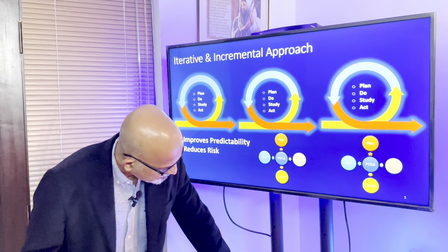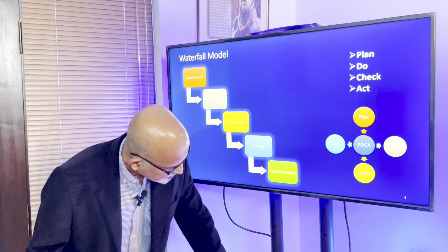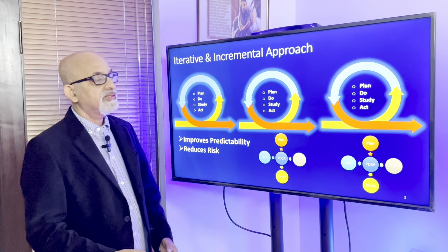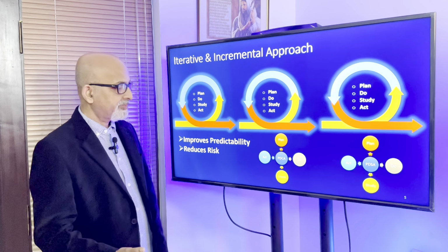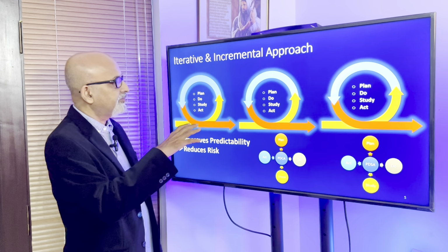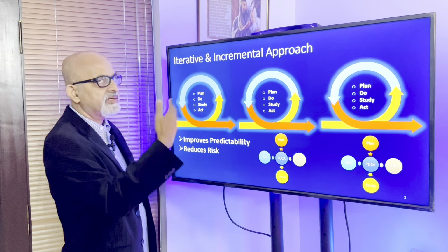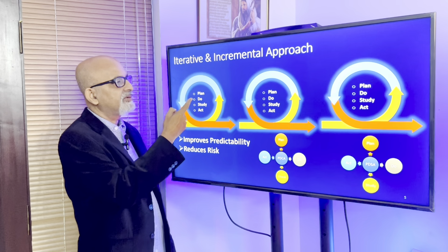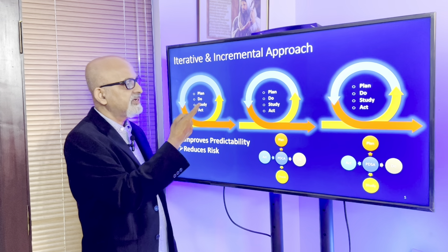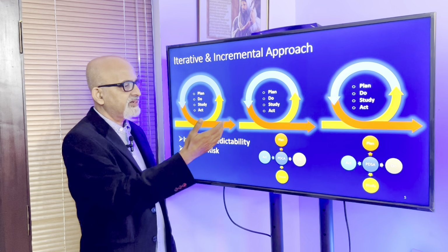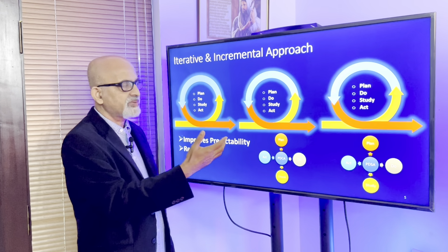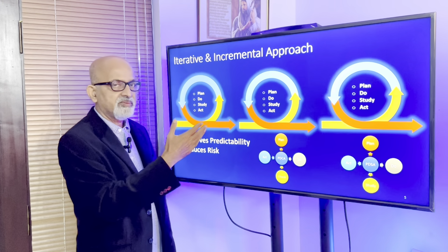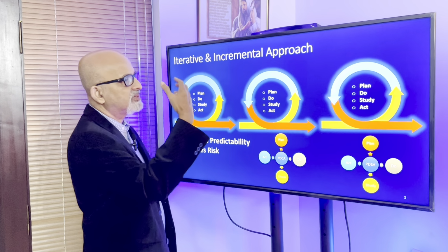Then we have iterative or incremental approaches, or adaptive or agile approaches, where we progress in the project through iterations, and for every iteration we'll have a little bit of planning and then we do things, and then we study. At the end of the iteration we do a retrospective and we study and put the corrective and preventive actions in place. Then we move on to the subsequent phases.